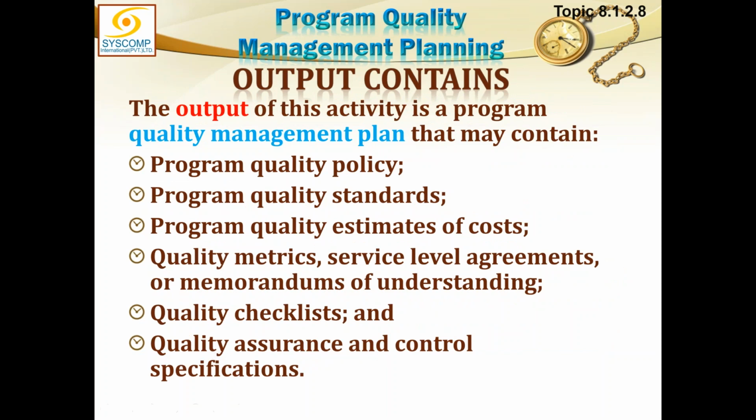So the outcomes coming out of the quality management plan are naturally the program's quality policy, not talking about the organization's quality policy, program quality standards, program quality estimate of the cost, quality metrics, service level agreements or memorandums of understanding, quality checklists for quality control, quality assurance and control specifications. All of these many things will have to be coming out of the quality management plan as output.